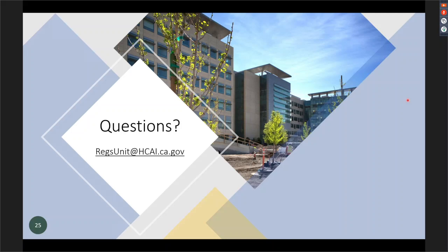Again, those would be considered RFIs. Confirming RFIs or RFIs or whatever. Yes, I've heard the term, I've used them. Basically, a confirming RFI by definition is a contractor asks a question with an answer, and all you do is confirm that the answer is correct. That's a true confirming RFI. So if you have an RFI that results in a change to the drawings, I don't care if it's called confirming RFI or not, it would need to be converted into an NMA if it changes the design.